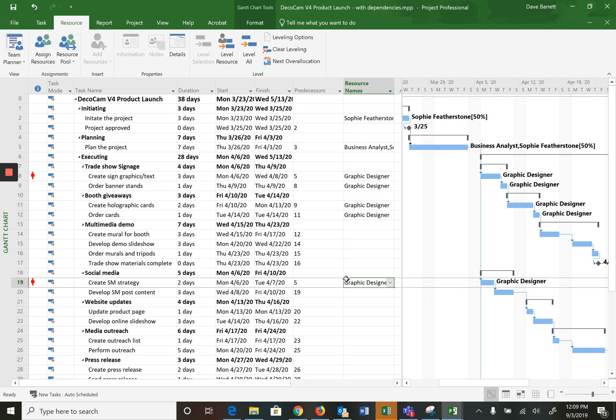And what it's telling us, that red person means you've over-allocated somebody on those two tasks, and specifically it's the graphic designer. Because you're essentially saying that person needs to work eight hours on create sign graphics text and work eight hours on create social media strategy on the same days, actually the Monday and the Tuesday, which is overtime, it's over-allocation beyond their maximum. So you don't want to do that. You want to clear up those red people.